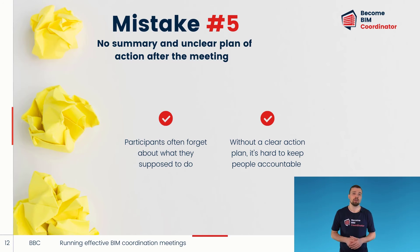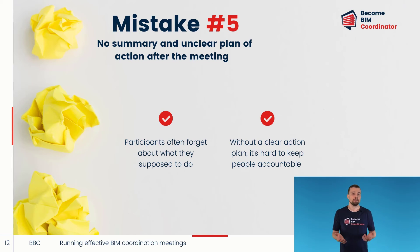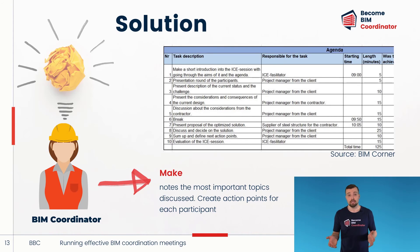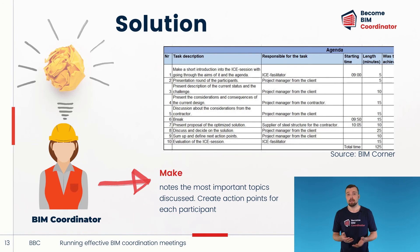Last but not least, mistake number five: not having a clear plan of action to ensure issues raised at the meeting get resolved. BIM coordination meetings aren't there to discuss design problems in detail. Rather, they aim to highlight the problem and force the relevant parties to decide who will resolve it. The real solutions are addressed after the meeting. But people get busy and often forget what they are supposed to do. To avoid this, the BIM coordinator or another delegated person should make notes on the most important topics discussed. These notes can be kept in one convenient place using, for example, an Excel spreadsheet. After the meeting, the BIM coordinator should send an email to each participant with the spreadsheet attached so everyone is reminded of what actions need to be taken and who is responsible.